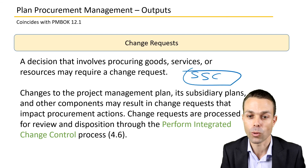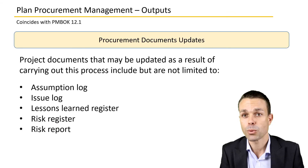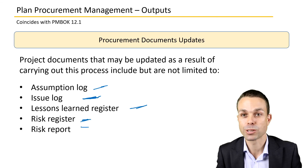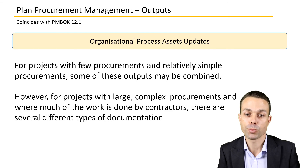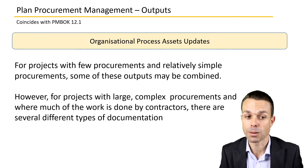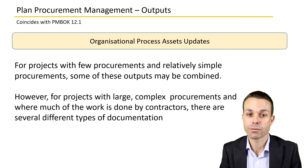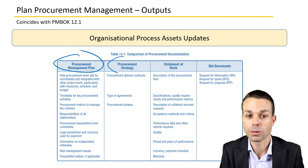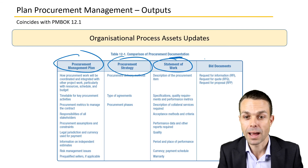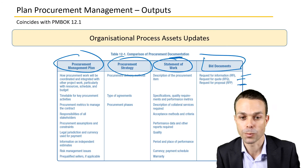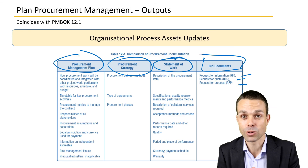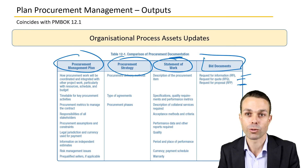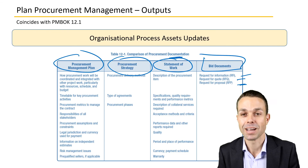Change requests will happen if we need to make changes to scope, schedule, or cost along the way, going through the change request process. Project document updates include the assumption log, any issues raised, lessons learned, the risk register, and the risk report. For projects with few or simple procurements, some of these outputs may be combined, but for large complex procurements where much of the work is done by contractors, there may be several types of documentation — procurement management plan, procurement strategy, statement of work, and bid documents such as RFI, RFQ, or proposal. This is what happens when we're asking someone else to do the work, and that's plan procurement management as part of the PMBOK.